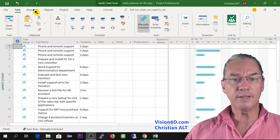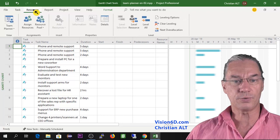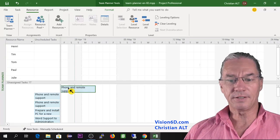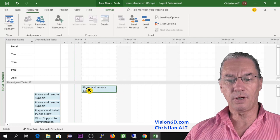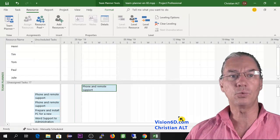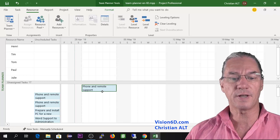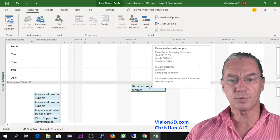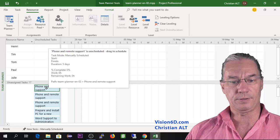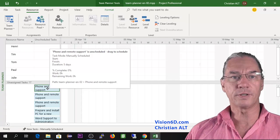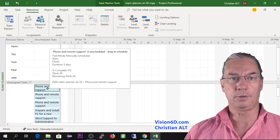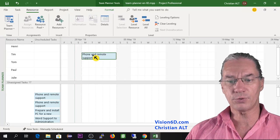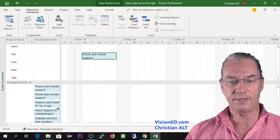In order to look at this more closely, we go into Resources and select the Team Planner. Once within the Team Planner, I can take a task and put it on this panel — we know we have to perform that task during that time, but it's still not assigned to anybody. I can move it around once positioned, or move it outside. Since phone and remote support is performed by everyone one after another, I position it here and say the first week it will be the team that performs this task.